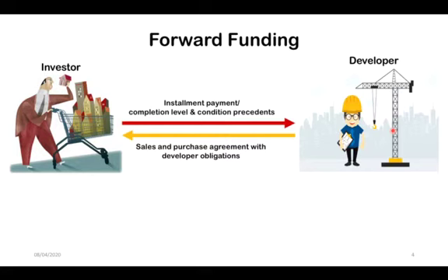In order to minimize the risk on the investor's side, not only the due diligence processes have to be more detailed, i.e. checking the validity of the local development plan, the contestability of the building permits, the solvency of the general contractor, the compliance of the general contractor agreement with the state of the art, but also the sales and purchase agreement has to provide for certain security mechanisms.